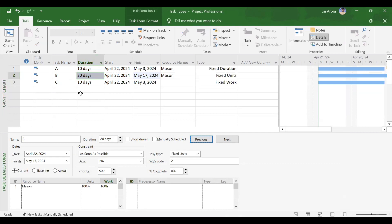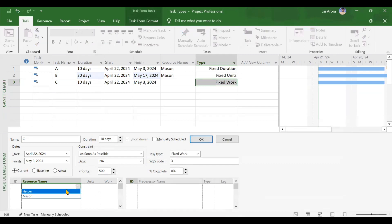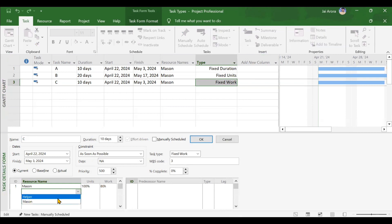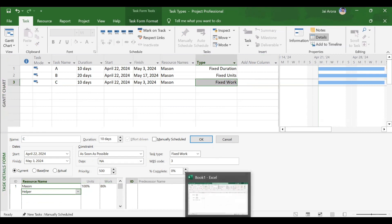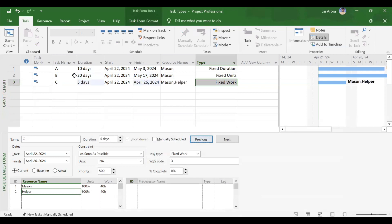Now the last task type: fixed work, which is very important and should be chosen carefully as it affects many things. Assigning one Mason and clicking OK. Adding helper as a second resource — units become 2 but work should remain 80 because this is fixed work. So duration will change: work is 80, units is 2, so duration becomes 40 hours — reducing to half. Clicking OK confirms duration is now 5 days. Mason works 40 hours and helper works 40 hours — both working 8 hours per day over 5 days.